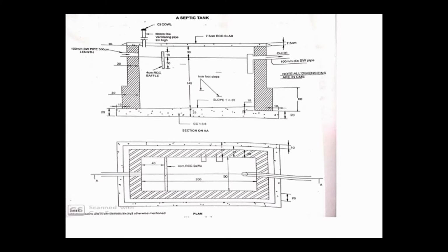That means once you excavate the soil, only then can you construct the whole septic tank inside. So what I have to do is consider outer to outer dimension, because the outer to outer dimension is the earthwork excavation, right? So outer to outer, and the height we have to consider is from the ground level. From the ground level below, whatever the depth is, that is your earthwork, right?